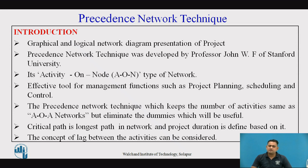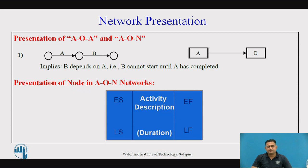We can show various dependencies and relationships between activities. In the first network diagram — the normal network diagram, called Activity on Arrow — activities A and B are represented by arrows, and events are represented by circular nodes. In the adjacent network presentation, the same activities A and B are represented by rectangular nodes, and the events are represented by arrows. This is the overall detail presentation of the Activity on Node, where activities are represented by rectangular nodes.